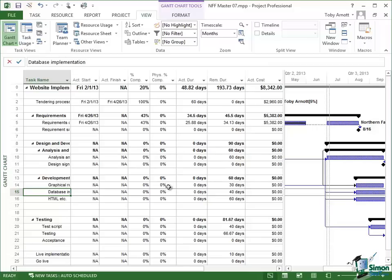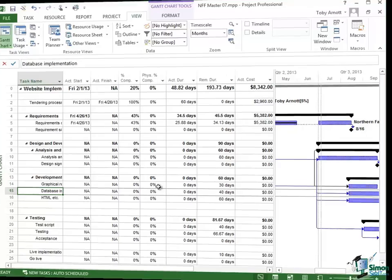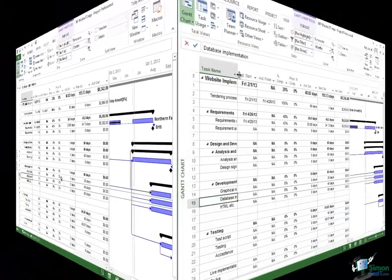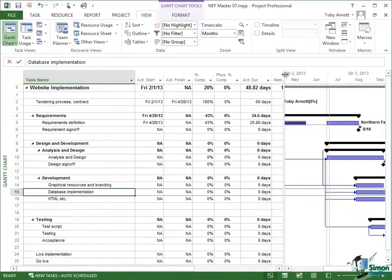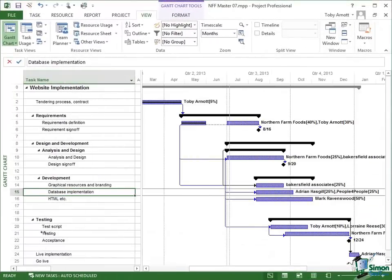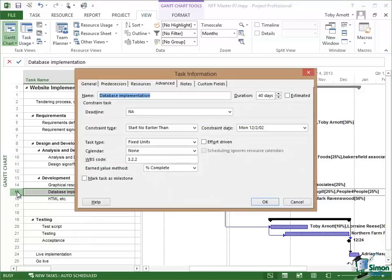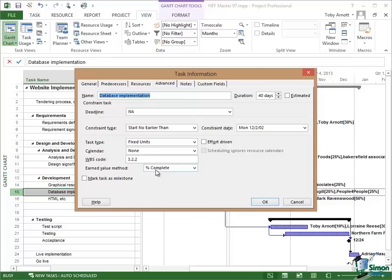Then when Project 2013 comes to do its calculations, its earned value calculations, it will use the physical percent complete figure rather than the percent complete figure. Let me just take one of these tasks and just open up its task information. Let's take this one, Database Implementation. If you look on the Advanced tab there is an Earned Value Method field here and this one has got it set to percent complete which means that Project will always base its calculations for this task on the proportion of the way through the duration of the task.